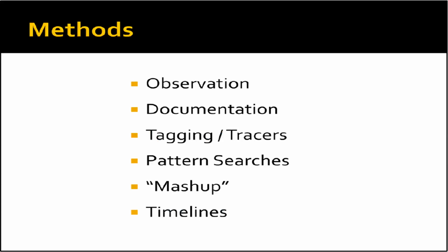Many of the methods that can be used for data collection after the project is officially completed are similar to those that are used for collecting baseline data and data during the project. Observation is one of the easiest to use, but can be difficult to ensure the validity of the results. This is mainly due to the fact that people often change their behavior if they know they are being watched.